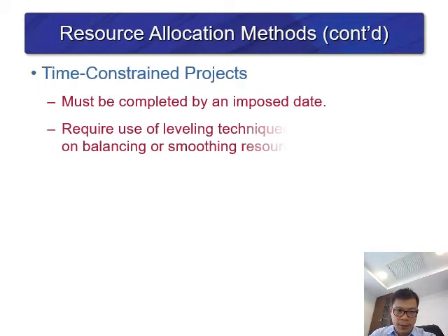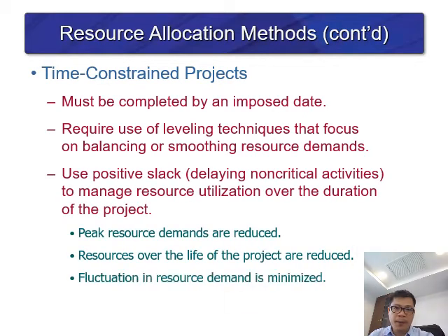Third, the time constraint project. It must be completed by the imposed date. It requires use of the leveling technique that focuses on balancing or smoothing the resource demand. And lastly, use positive slack, which delays the non-critical activity to manage resource utilization over the duration of the project.